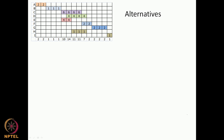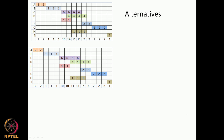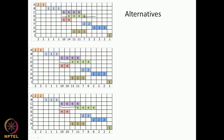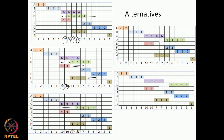This is the basis on which we are going to do some exploration. Looking at different alternatives, D is moving within its float — shifted by one here, by two here, and by three here. As D moves, you can see the resource profile is changing: here you have 10 and 14, here you have 10 and 10, here it becomes 7 and 11. Similarly, I can move H to change the profile, and I can move E to change the profile.